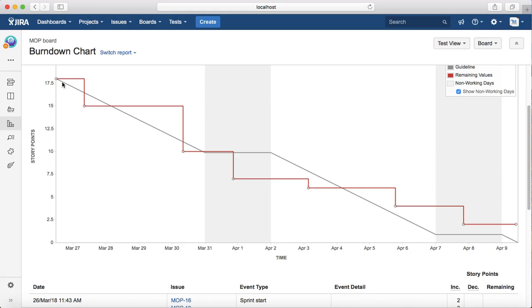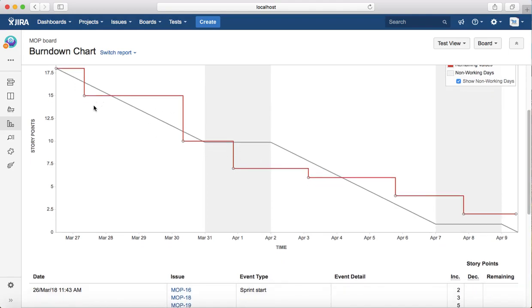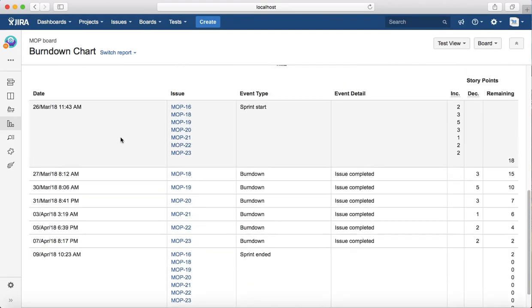The gray line here is the ideal scenario of how the burndown chart should look like, but that's very unlikely—that's not going to happen. It will be uneven; on particular days the team will be able to complete more points, and there will be some other days when the team won't be able to achieve because there's work in progress. For example, for a particular task, it will need two days to complete, so for the next two days that person won't be able to claim the points.